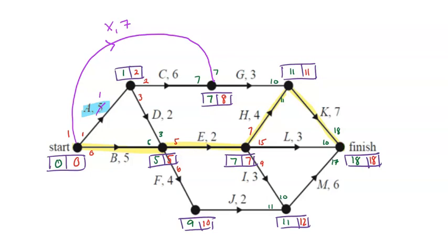The other thing we can see is that A now has a float time of 1. So we've reduced it by 1 too many. Therefore, we can say A, we need to reduce by 3 only. This is where we need to double check we're not throwing anything out.